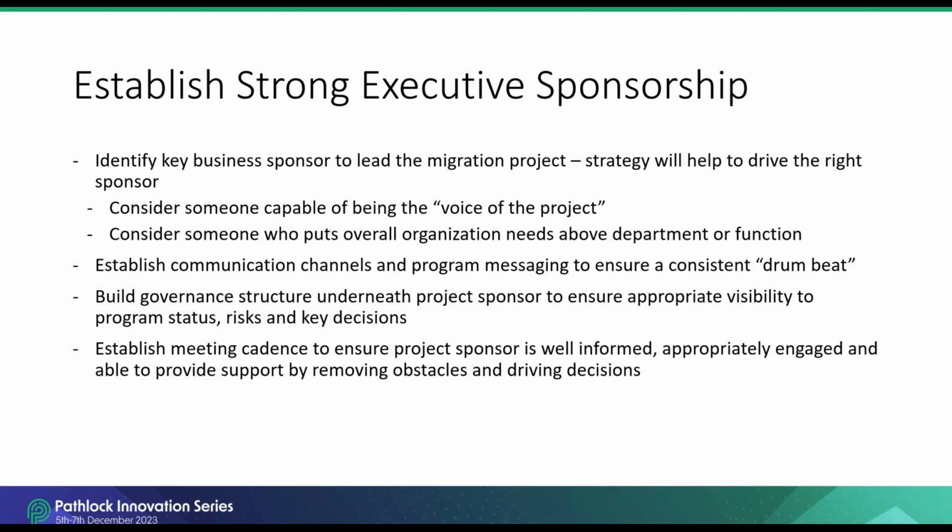Also important is to establish a program governance structure that can support that project sponsor and to make sure that they are kept up to date on all key decisions, any risks, and the overall project status. Along with the governance structure, it's important to establish the right meeting cadence to make sure key decision points are being escalated as appropriate, to make sure that the sponsor and executive team remain engaged, and so that they can remove any obstacles that may come up during the project. And we'll get into governance in even more detail later in the discussion.